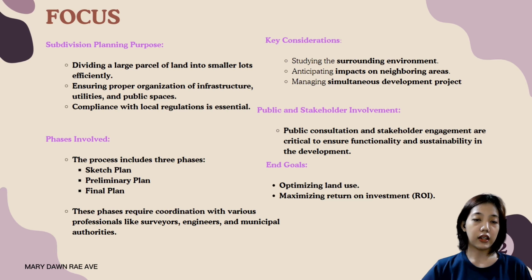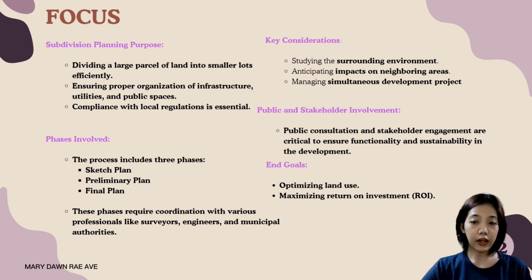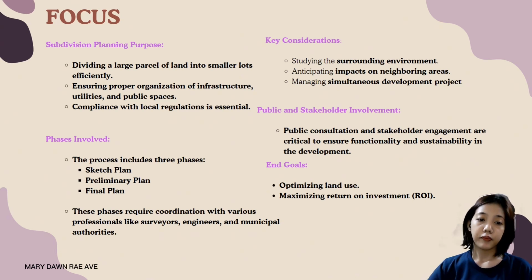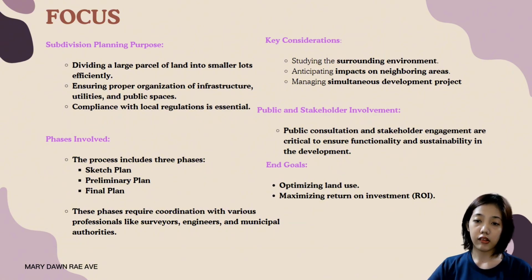Then subdivision planning focuses on efficiently dividing a large parcel of land into smaller lots while ensuring infrastructure, utilities, and public spaces are well organized and compliant with local regulations. And the process involves multiple phases, from sketch plans to preliminary and final plans, requiring coordination with the surveyors, engineers, and municipal authorities.